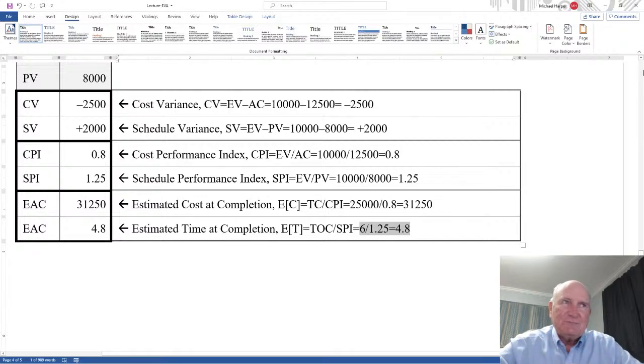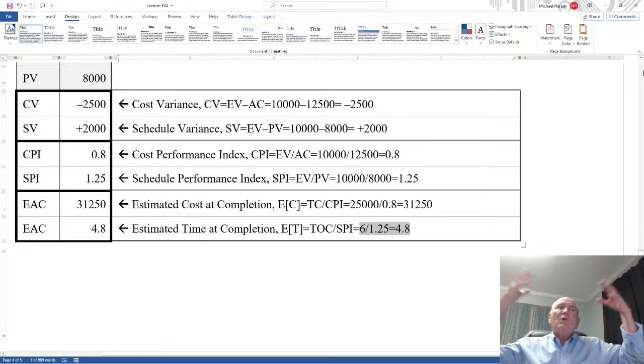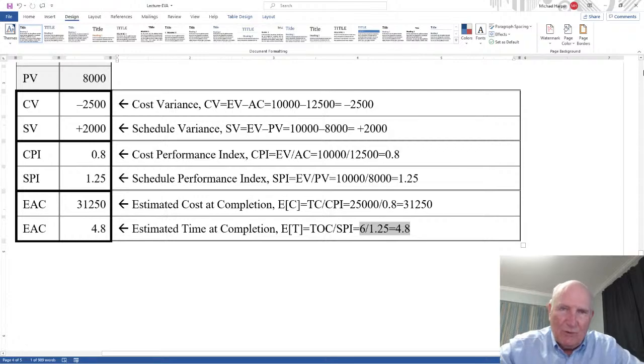And you guys probably know as well as I do, marginal cost is usually fairly small. That marginal cost, making it early, their revenue would more than offset. So the hospital administration came back and said, do it. Get it done early. Overspend. We'll find the money. I said, okay.